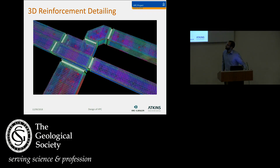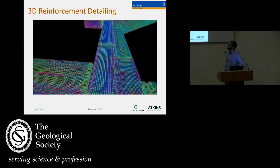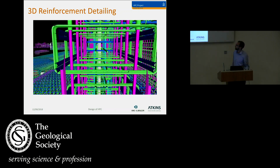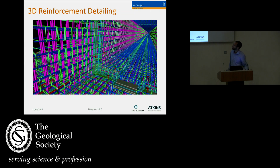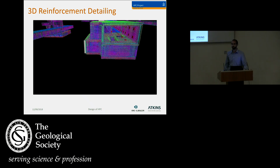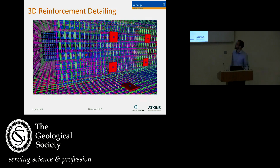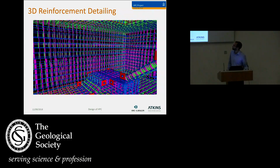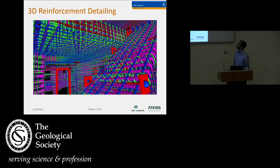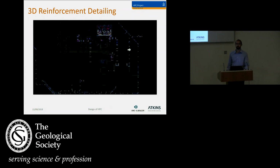And this is a final fly-through of the Tekla model that we've developed, effectively the 3D reinforcement. This is every single bar in the technical galleries. You'll see as it flies through every link as well, in areas of potential clashes with staircases, with embedded features, which is often a key area for where clashes happen, so anchors and things like that. It can include all of those. You can see the staircase there as it flies through. I think there are over 2 million bars in this model, which ordinarily would have to be done in drawings and then exported and often declashed on site.